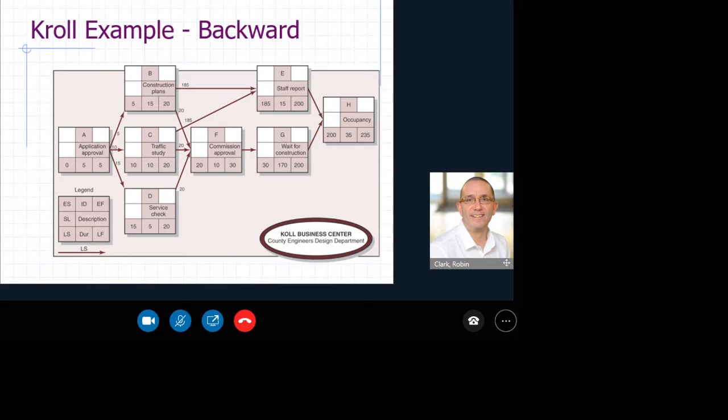And then we're faced with 3 arrows coming into activity A on the left side of the network. And here we have a 5 coming down from B, we have 10 from C, and we have 15 coming from D. And again, same logic, we take the smallest number. So it's 5, we then take the 5 and we get a 0. That's really important.